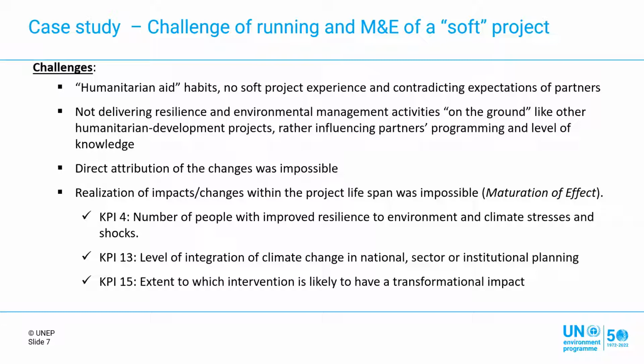So what were the challenges in all this experience of a soft project in Sudan? Well, Sudan was very much used to seeing humanitarian aid kind of projects. There was no soft project experience. They wanted to see activities, some buildings constructed, some dams constructed, or training programs organized, which we did. But that missing soft project experience created contradicting expectations of partners. Some government counterparts wanted to control the budget. Some wanted to have a word in some of the activities of the budget, or the implementation.